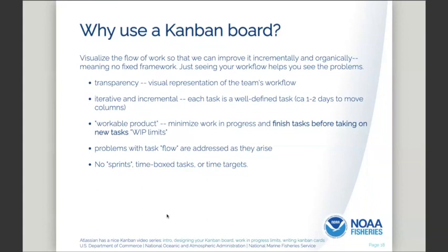You had a problem there. So then as a team, when you reflect, you're like, okay, we've got to do something about that, because that review step is just backlogging everything, and it's adding a month to the project, or to our paper publication rates, and we need to try something else and see if we can fix that. Okay, so that's the transparency aspect.